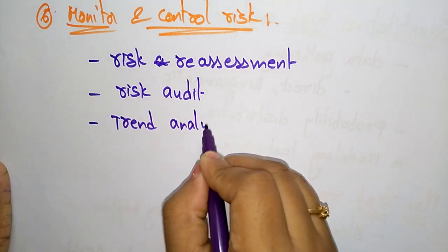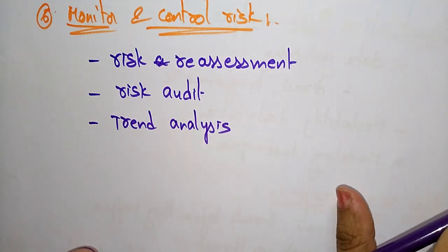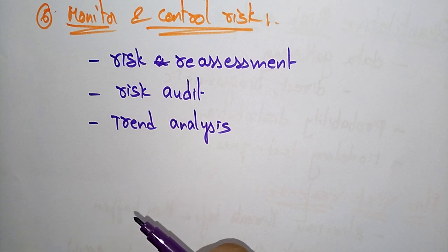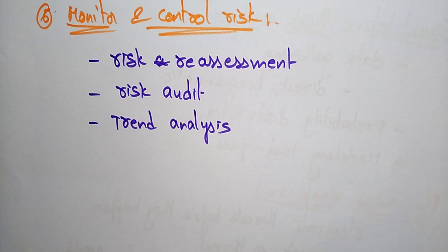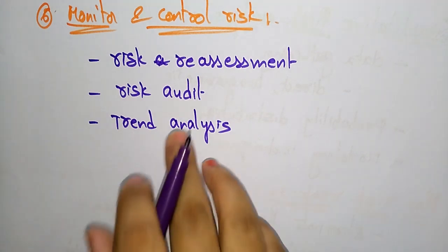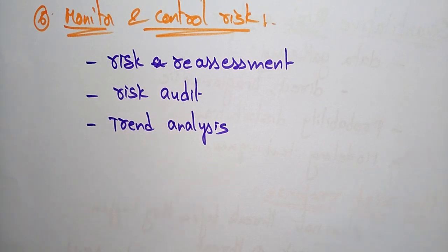Trend analysis is used to monitor overall project performance. To summarize: risk re-assessment means reassessing risks by scheduling reviews on a regular basis; risk audit examines the effectiveness of planned risk responses; and trend analysis monitors overall project performance. These are the six risk management processes in project management.